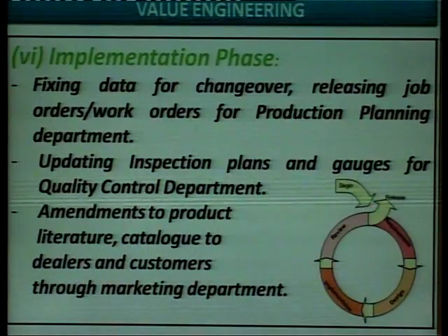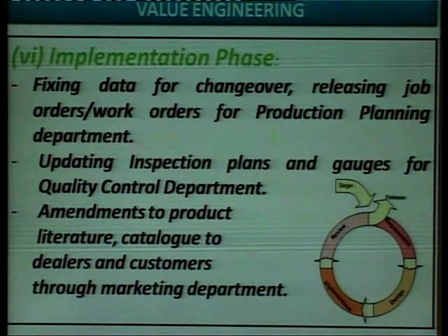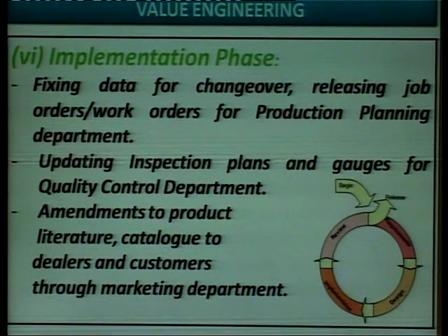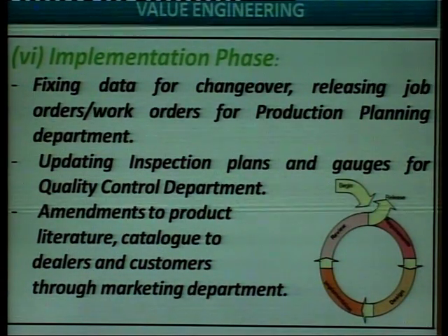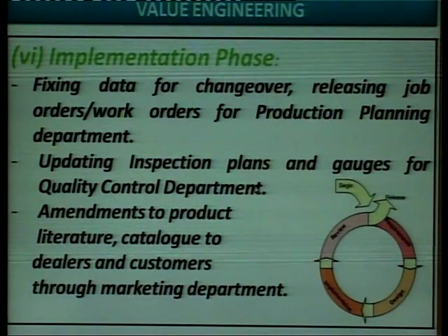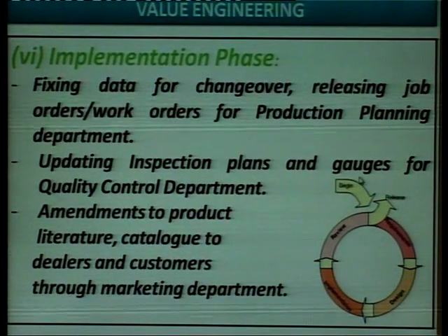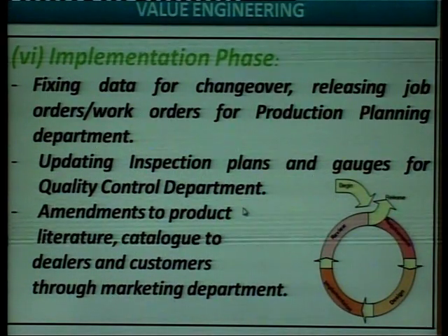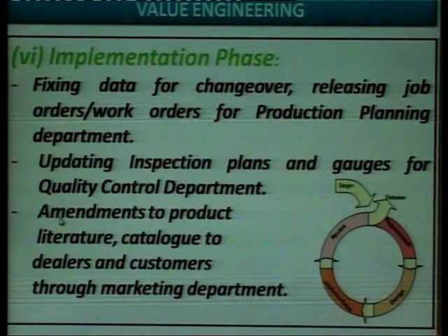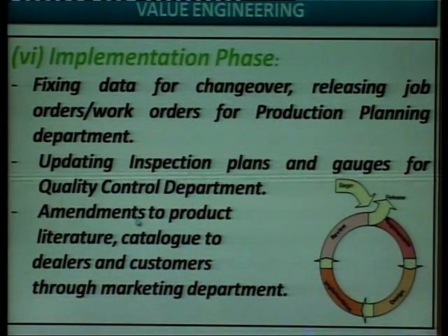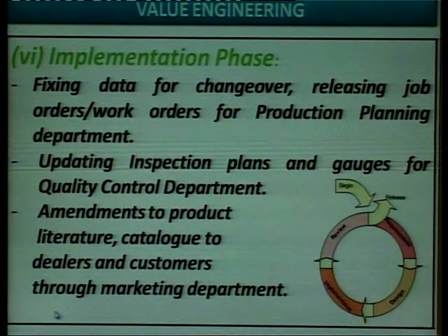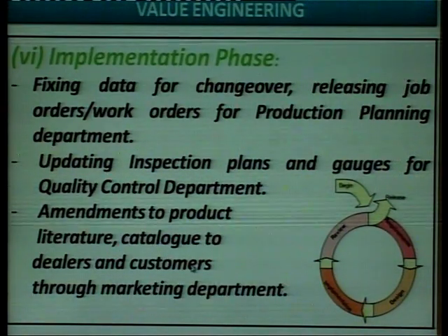Fixing date for changeover, releasing job order, work orders for production planning department, updating inspection plans and gauges for quality control department, amendments to product literature and catalogs to dealers and customers through marketing department.